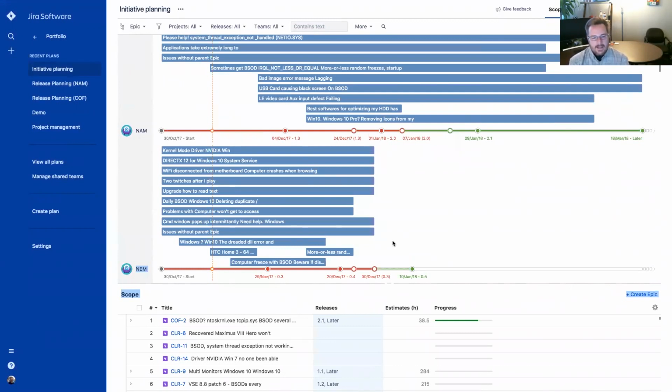And this feeds an idea that we've built in with a lot of our customers: let's create this barrier, this boundary, where below the barrier the development teams are able to focus on their work, and they're not distracted by the concerns, priorities, and questions coming from the executive team. And then we've got the executive team, which is not looking at the low-level issues. Obviously, sometimes you have some that do, but you have this general focus on the broader question: what is the scope? And then in the middle barrier, this is where you have the project manager or the project lead, and they update the fields and the issues across the initiatives to get the proper information up.